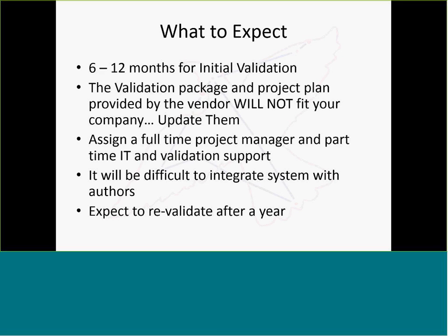If you leave as is, then your system will be dragging you down. What you do is, after you've gotten some good experience with the system, you are in a position to really configure it with how your company operates. So expect to budget another validation project for about a year after this initial validation is finished.